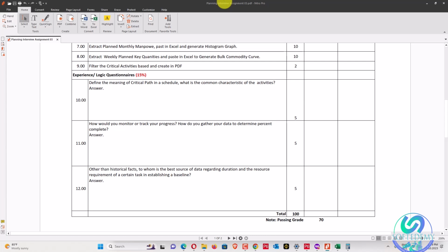The critical path is a sequence of stages determining the minimum time needed for an operation. It is the longest path in the schedule with the least amount of lag. If there is zero lag, then that is the least amount of lag on that critical path. This means any delay in activities on the critical path will directly impact the project's completion date.